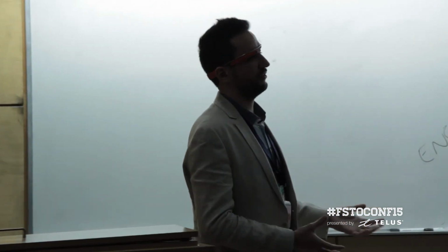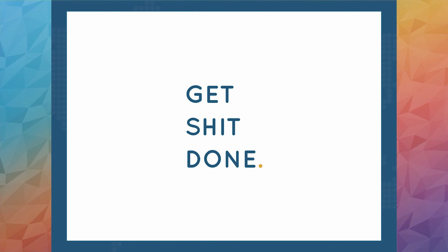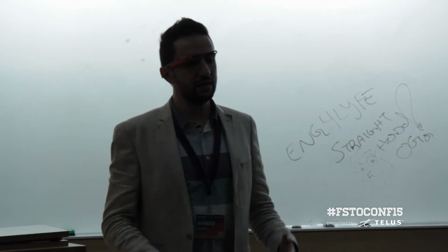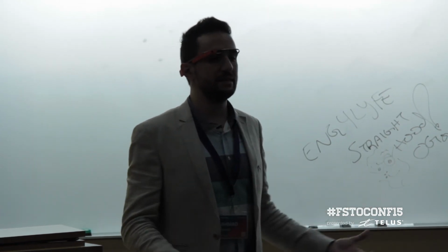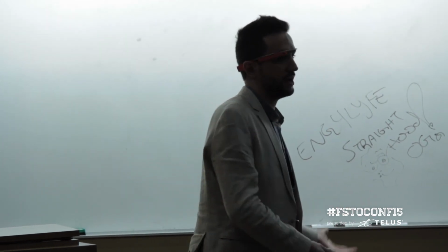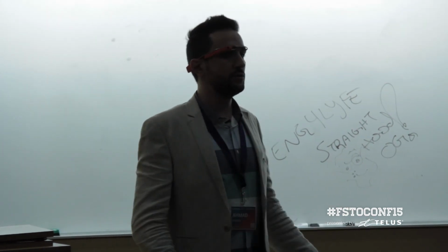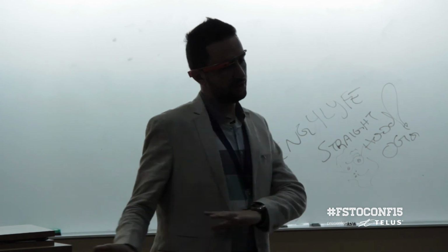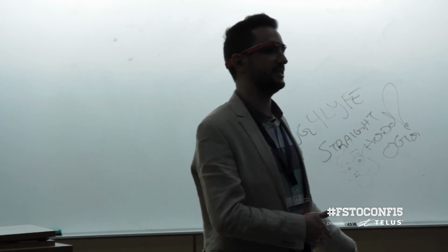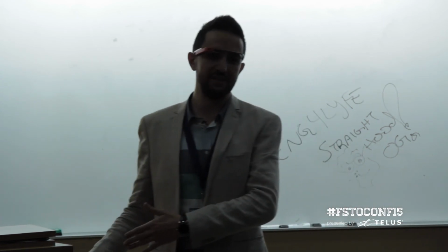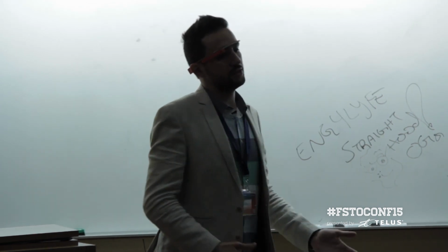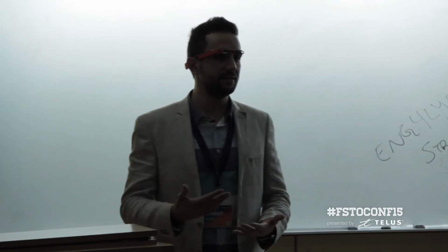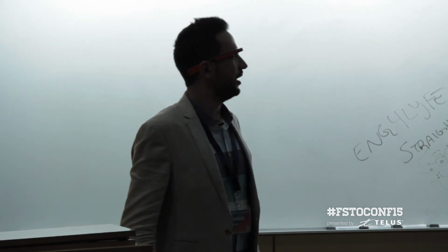If you think about Agile, if you think about Scrum, there's the principle of having daily meetups or daily Scrums or status updates at the end of the day. That works when you're within the same geographical region, even if you're not in the same city. If I'm working with somebody in Montreal and I'm in Toronto, that kind of works. We can still do that. But that goes out the window when you have a 12-hour time difference and the start of your day is the end of somebody else's day. Or vice versa, if at the start of their day, you've already finished your work. So having that daily status update doesn't translate well anymore.